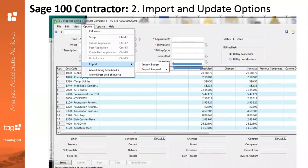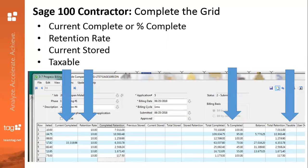Number two: Import and Update Options. Once you've entered in all of your setup information, you have the capability to import your items from either your budget or your proposal. You'll head up to the toolbar, hit Options, and select Import. You'll see those two options pop up — you can either click Import Budget or the proposal. Then you'll complete the grid, entering in either the current complete or the percent complete. You can put in a retention rate, or pull in the defaulted retention rate entered in the setup screen. You can also enter in the current stored and whether or not that item is taxable.